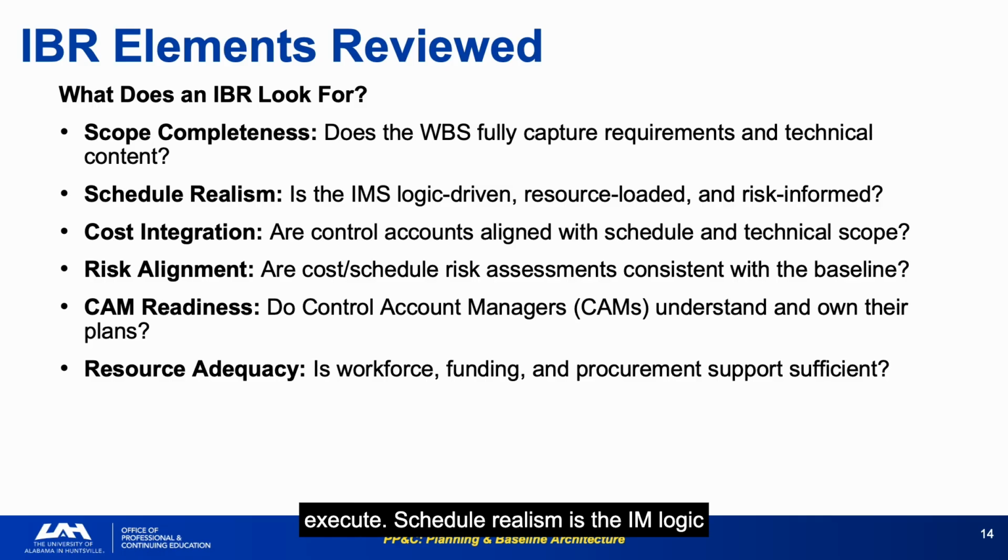Schedule realism. Is the IMS logic-driven, resource-loaded, and risk-informed? 3 criteria, all required. A schedule that is logic-driven but not resource-loaded, or resource-loaded but not risk-informed, is incomplete. IBRs that find no cost integration issues on programs that have obvious WBS schedule mismatches are IBRs that weren't conducted at the right level of detail. The findings should match the program's actual state.